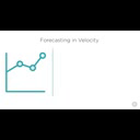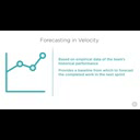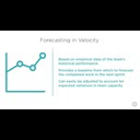In fact, we call this number the team's velocity. A team can use their previous velocity to help forecast the work they expect to complete in their next sprint, even adjusting it down as necessary to account for variables such as the entire team being off for a few days to observe a major holiday, or an individual team member taking a significant amount of vacation time during the sprint. But since this is your first sprint, we'll simply ask you to tell us when you feel that we've selected the most work that the team can complete in 2 weeks, and we'll stop there.